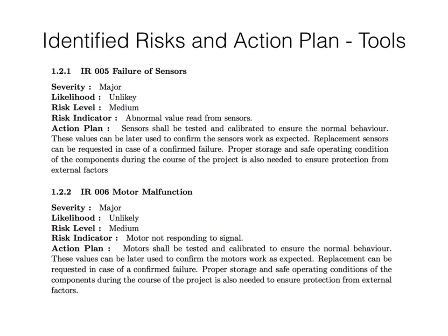How the team should handle this risk is by testing the sensors to know their normal working condition, so that if there is a deviation from this working condition, the team can have a backup plan to detect the failure of sensors. And if it's a confirmed failure, then the team can request replacement sensors.